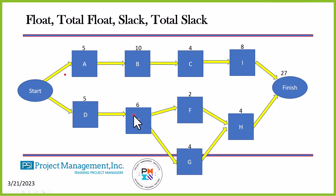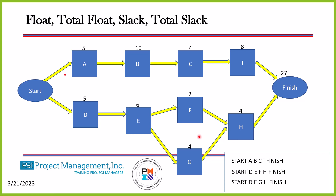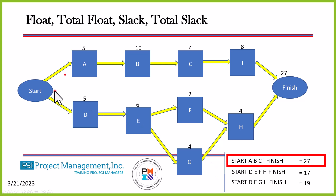What do we do with this information? We look at this network diagram with our duration estimates and discover what the total float — also called total slack — is. Float is how long an activity can be delayed before it becomes a critical path item. We start by doing the paths at the bottom, then calculate the actual duration of each path. We determined that Start-A-C-I-Finish is the critical path. We went through each path, identified them, and added up the durations for each path, giving us the duration estimates.